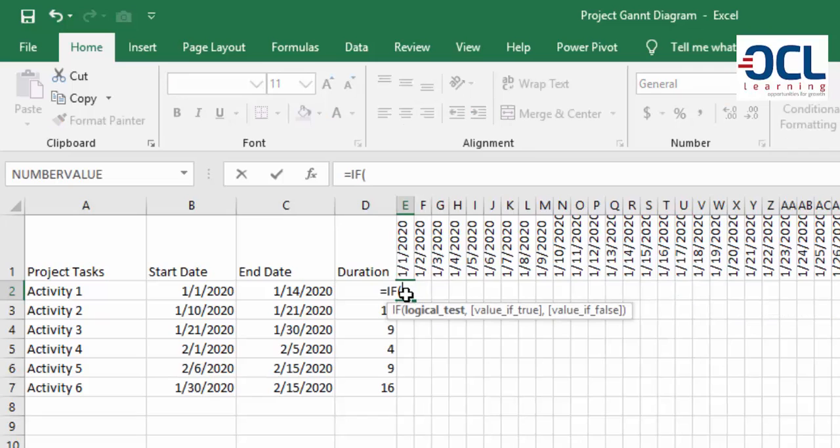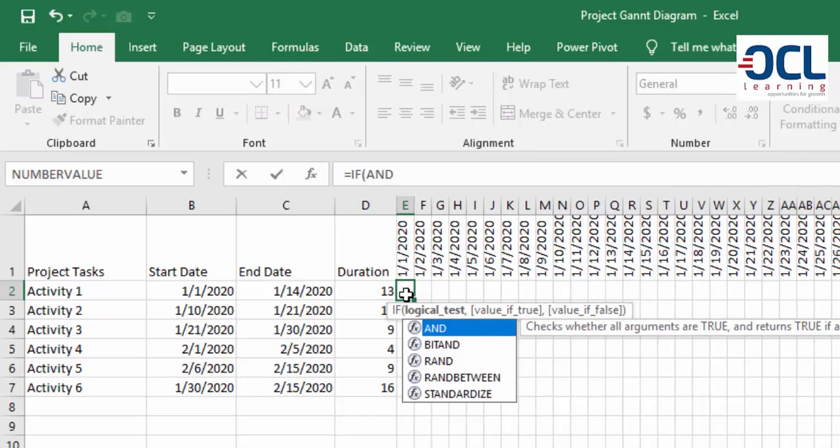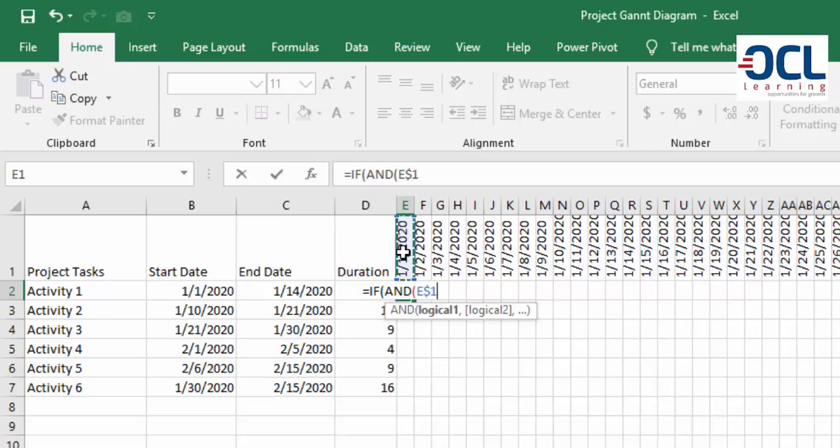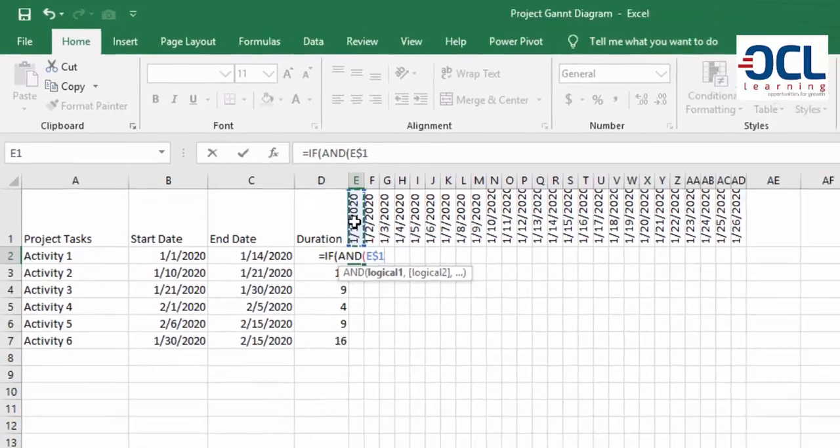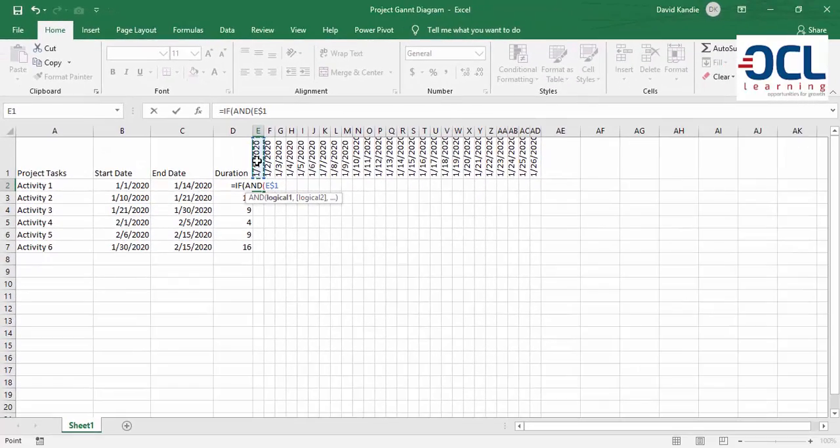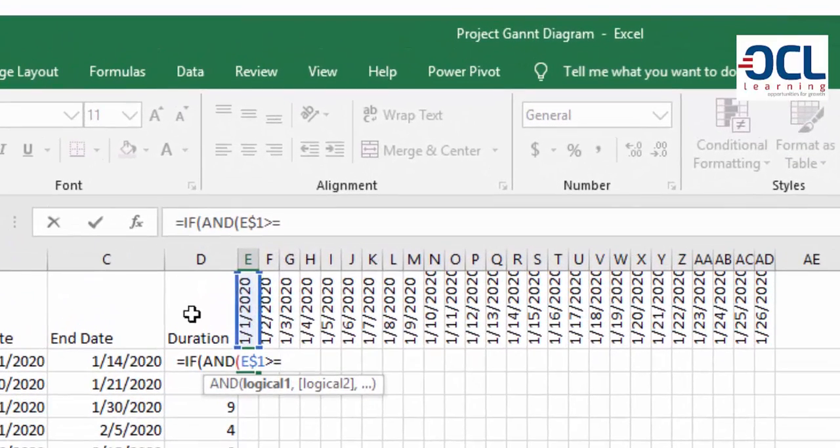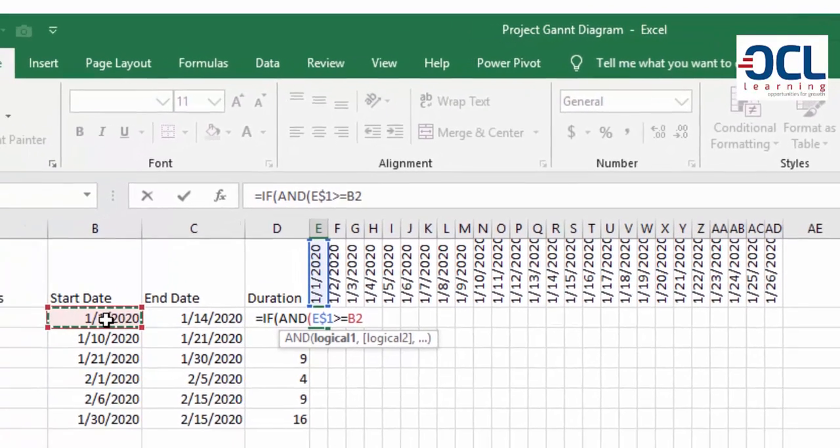So I say that if this date, and you need to lock the row by pressing F4 twice, is greater or equal to the activity start date.